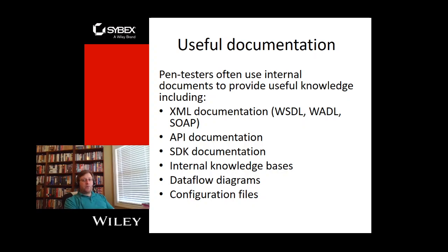This is a problem in a whole lot of government contracts, where customers will frequently ask you to add features to the product because they think it's not going to be much trouble, and it winds up being a lot of trouble and can cost a lot of money. Most contracting places are happy to do that if they're being paid for it. But if you are just being asked to add things to the test or to the product that you're doing, scope creep is something to be aware of.